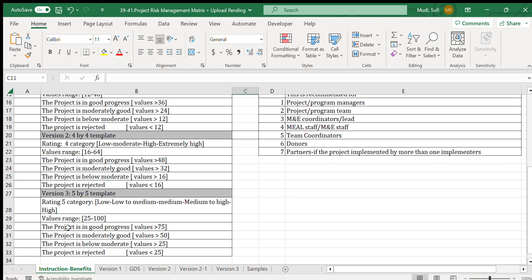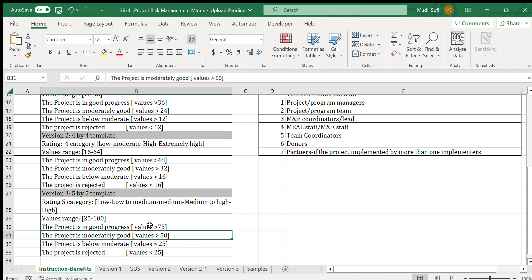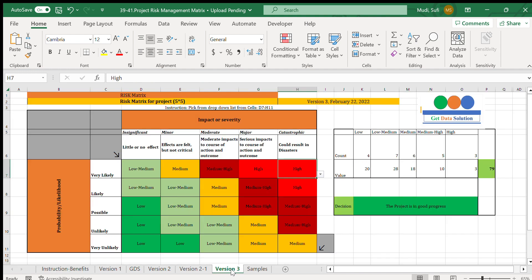The project is in good progress if the rating value is greater than 75, moderately good if greater than 50, below moderate if greater than 25, and rejected if less than 10 to 5. So the thresholds are: below 5 is rejected, 5 to 50 is below moderate, 50 to 75 is moderate to good, and above 75 is in good progress.